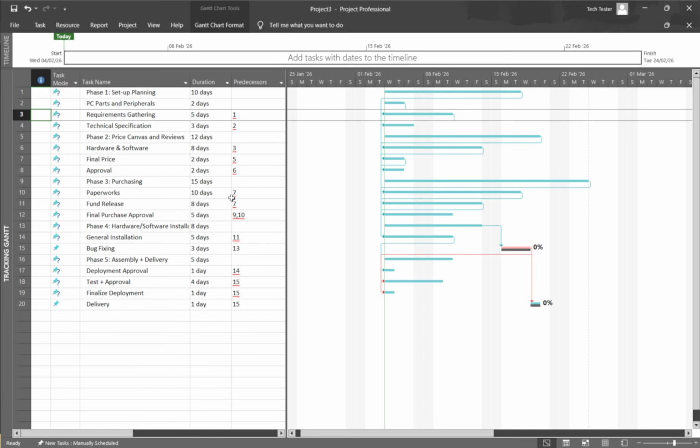That's it. Set your baseline once your plan is approved, and use additional baselines judiciously to capture meaningful changes. This simple habit gives you clear, data-backed insight into how your project performs over time.